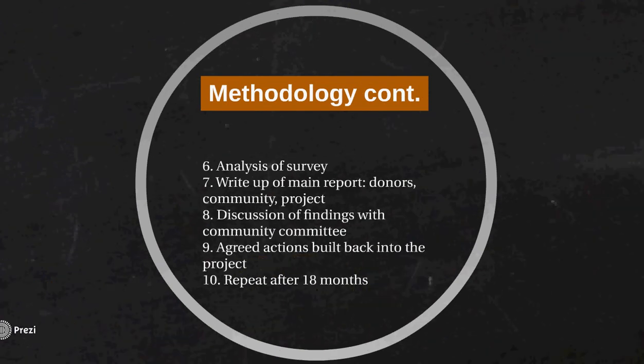Surveys will be quantitatively and qualitatively summarised and analysed. Step 7. Findings will be written into a main report and then used in 3 different forums: in a written report to the donors, in a report and briefing to the community, and in a report to the Project Management Committee.